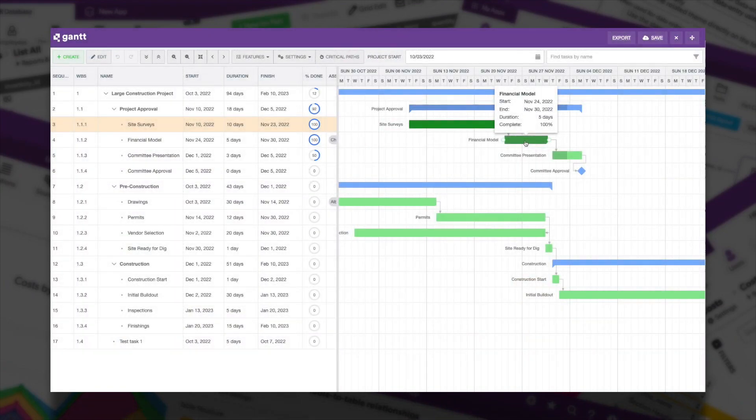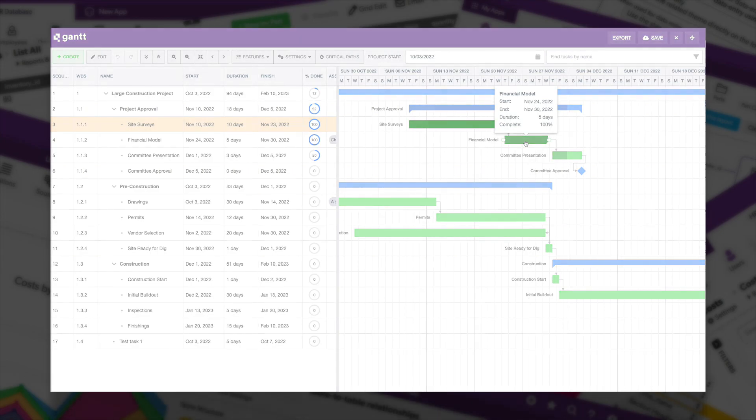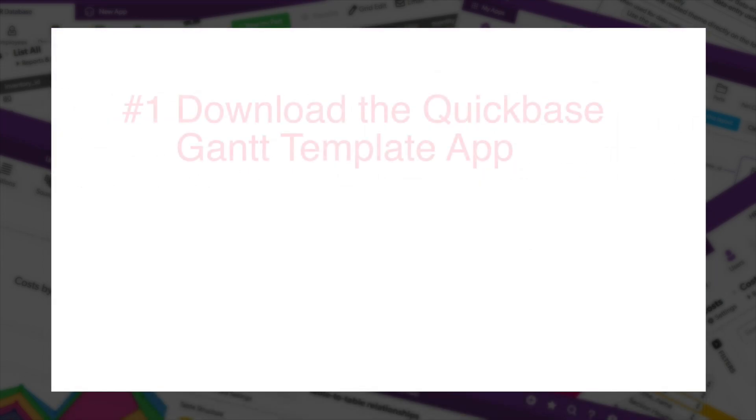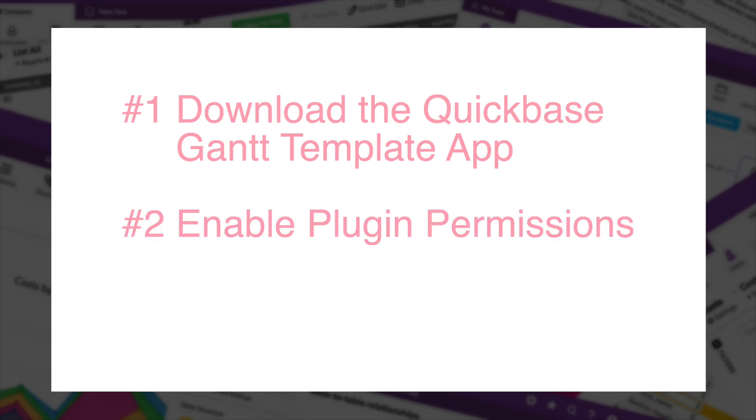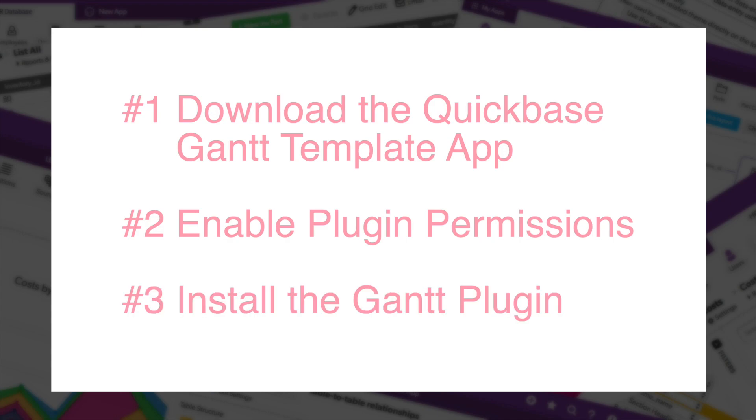The new Gantt plugin from QuickBase is amazing, but there are three steps we need to take before we can start using them. The first will be to get a specific app from the AppExchange, and then we need to enable the permissions to use plugins, and last, we need to install the Gantt plugin itself.